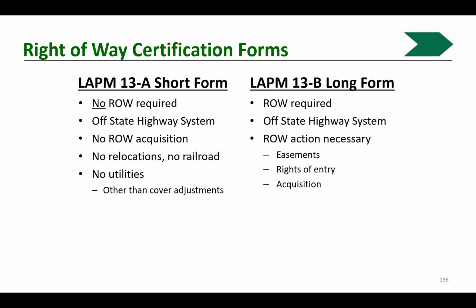And then if you start the next piece of an overall project, that's the 3rd and 4th blocks, then that stands alone. And if that's all local state funded, then you don't need to do NEPA for that. They're considered 2 separate projects, even though they're similar, and the community is looking at that as one major improvement. Is that right, Peter? Am I getting that?